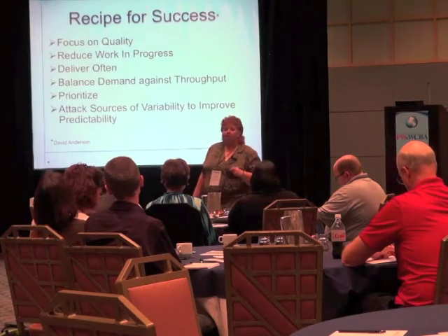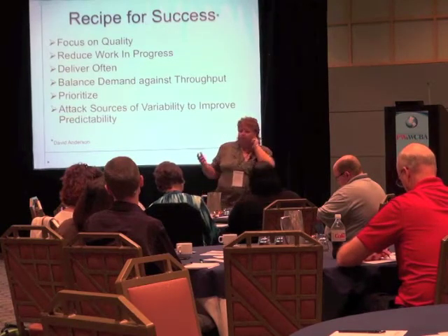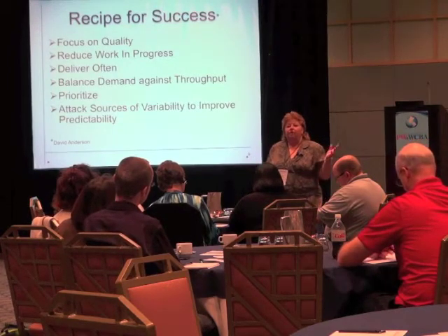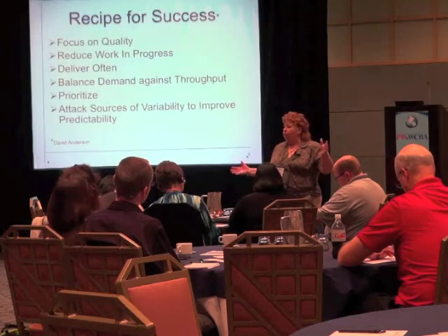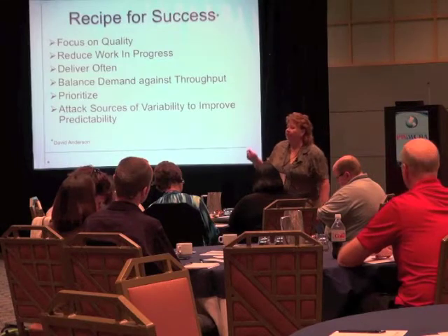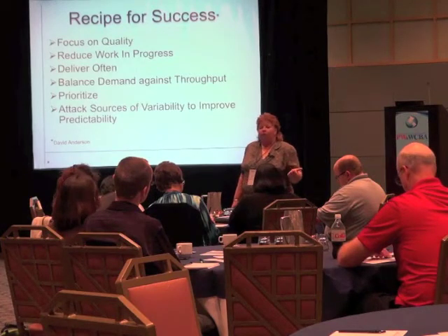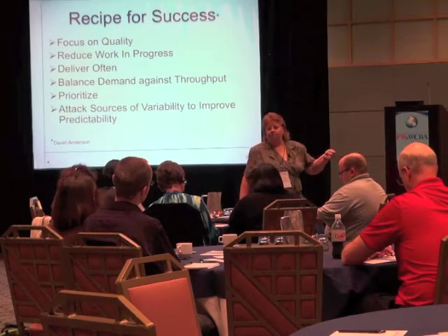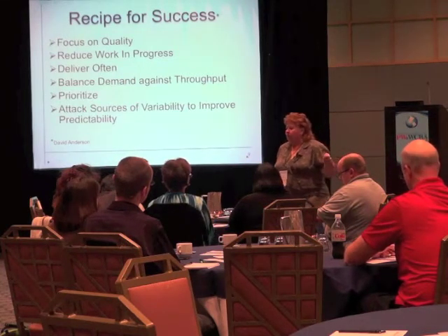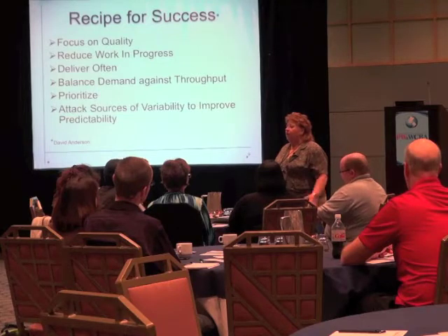And what you need to do is become more predictable. The way to do that is to limit the variation. So for example, if you have a mixed queue of work, that's small, medium, and large items, and someone's going to say to you, when is this item going to be done? And you're using cycle time as your measure, and you've got all these things in the same pile, your cycle time reflects the average throughput for the various sized items. So when an internal customer comes to you and says, when is this item going to be done? And you give them the average number, and they're like, what the heck is it going to take so long? This is some itty-bitty change. Why is it going to take me 2 weeks to get this done? Well, it's because the answer you have is an average answer.